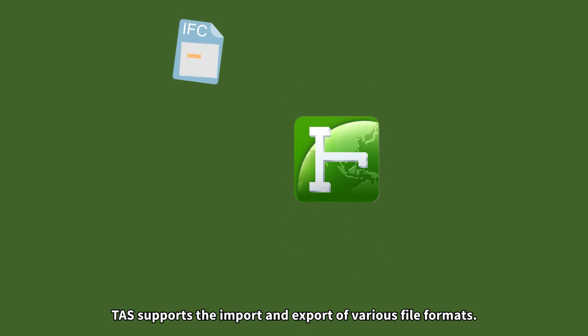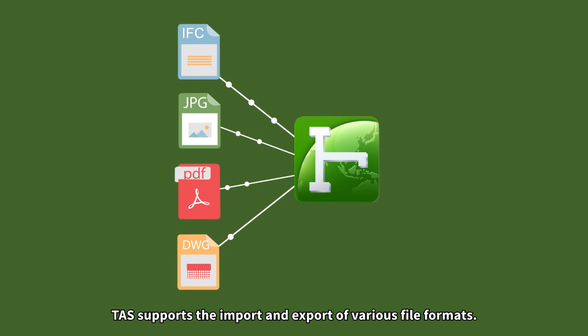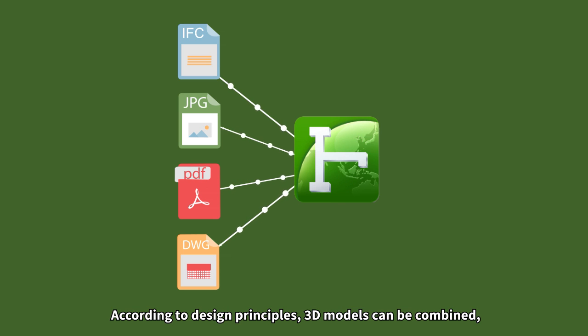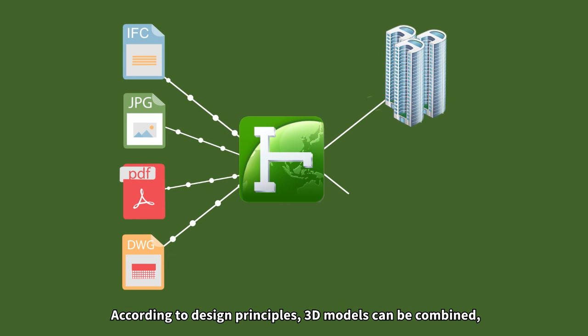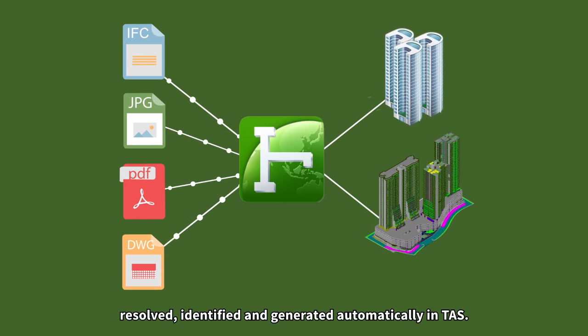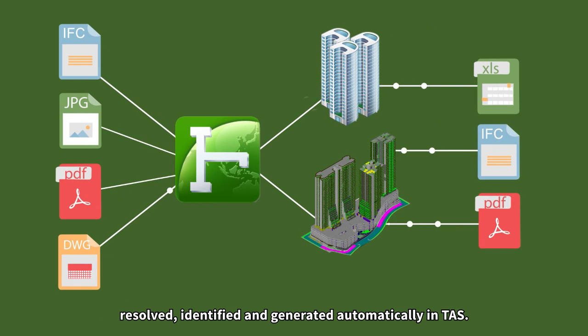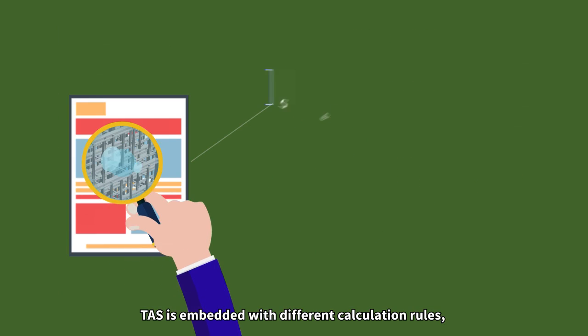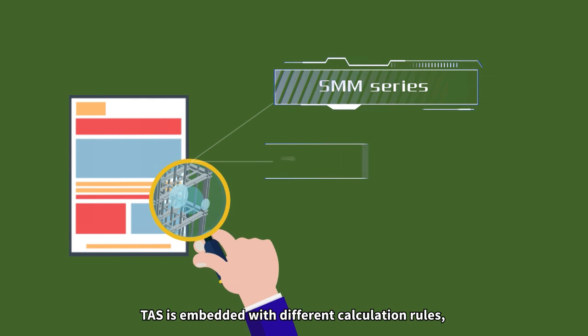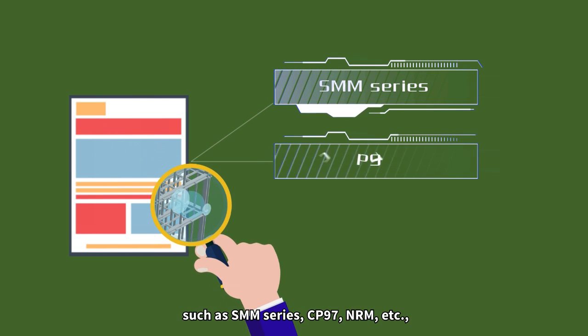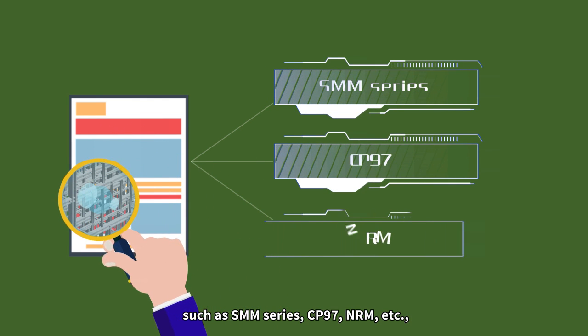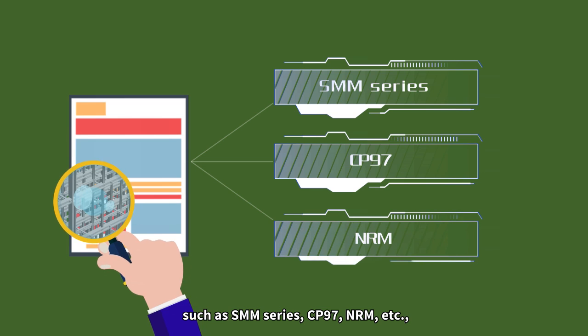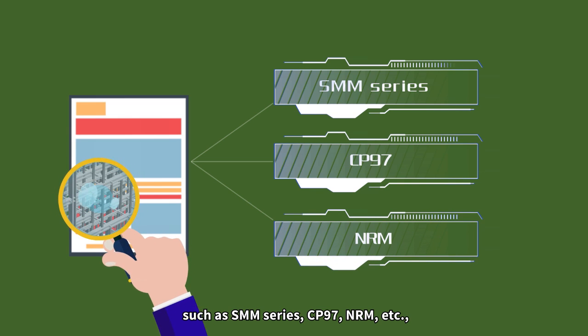TAS supports the import and export of various file formats. According to design principles, 3D models can be combined, resolved, identified and generated automatically in TAS. TAS is embedded with different calculation rules, such as SMM series, CP97, NRM, etc.